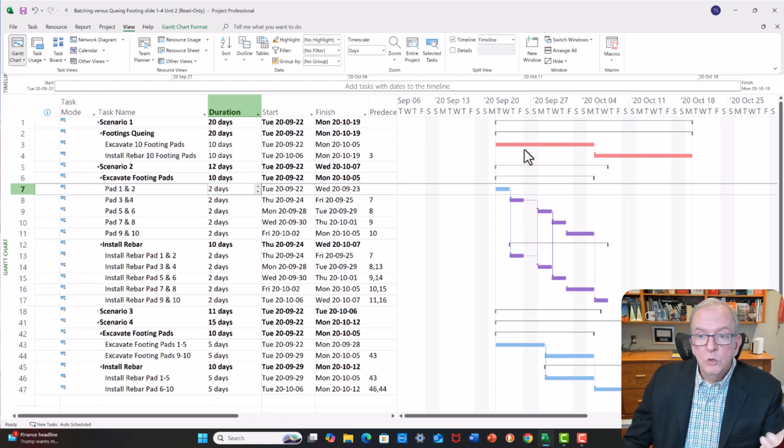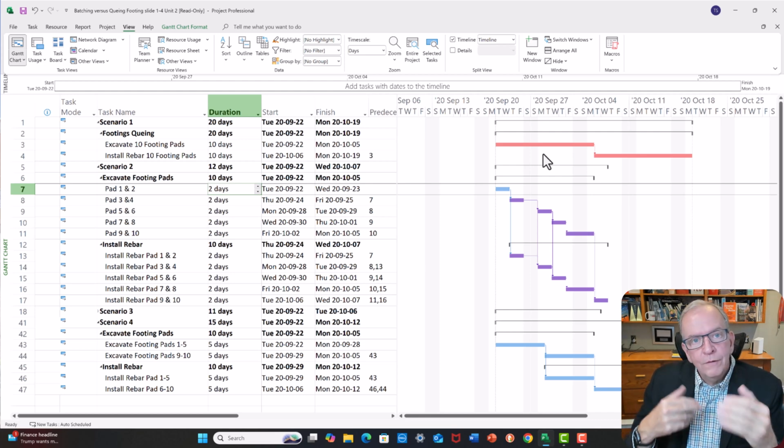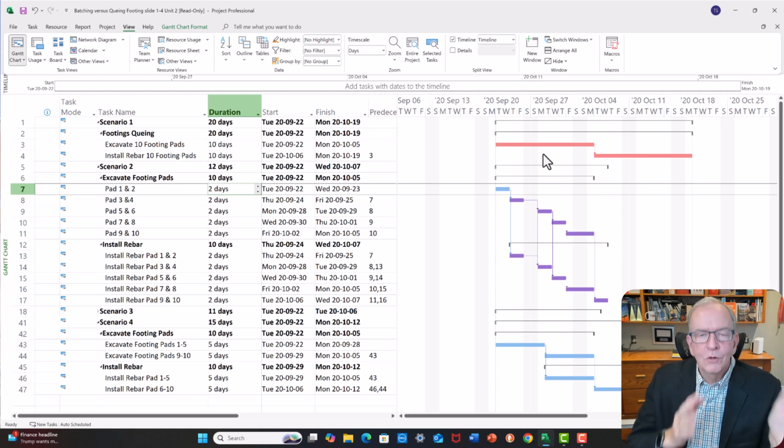2 instead of 10. I think that's huge, right? That's giving you a much quicker feedback loop, so that if you do make an error somewhere, then it's quicker feedback. Anytime that you can get quicker feedback, you're learning. If there was something minor, you're tweaking it, you're learning, and you're getting better as you go.